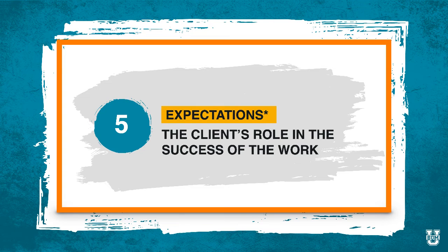The next piece is optional, which is why there's an asterisk there, but it's the expectations. What are the things that the client is going to need to be prepared to do in order to make the work a success? You need to make sure they understand what their role is in the success of the project. Maybe they need to provide feedback or a response within a certain time frame, or maybe there's a rescheduling policy they need to be aware of, that if they reschedule their coaching sessions, it's going to throw off the time frame that they want to complete the work. Whatever it is, make sure the client is clear on what their involvement in the project is going to be.